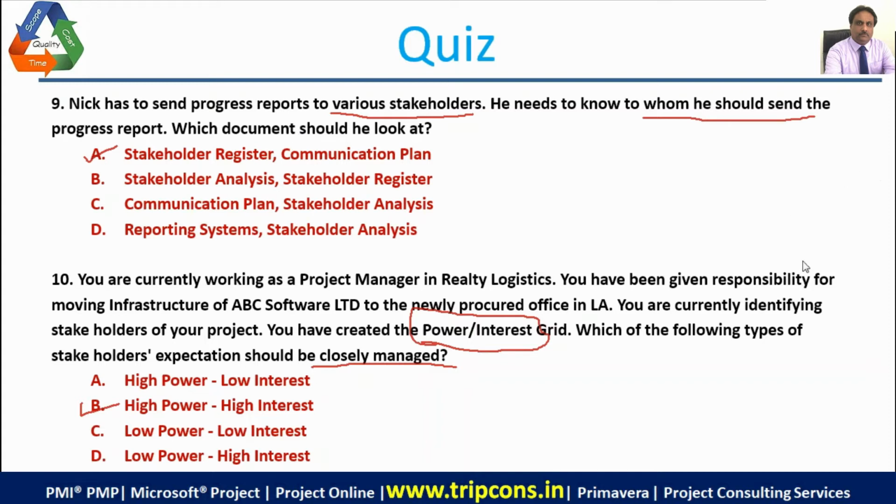So if you're working in a large project with many stakeholders, make sure that none of the stakeholders are missed starting from the beginning, from the requirements, and you should always make user acceptance test criteria. That is an expectation list, because the test criteria says very clearly what tests the product should pass so that it can be accepted by the user as correct. You can create a UAT milestone wise. For each milestone, you should have a UAT, and all these UATs will add up to the final UAT for the product. For the product, you can have certain different features which will be tested after integration.